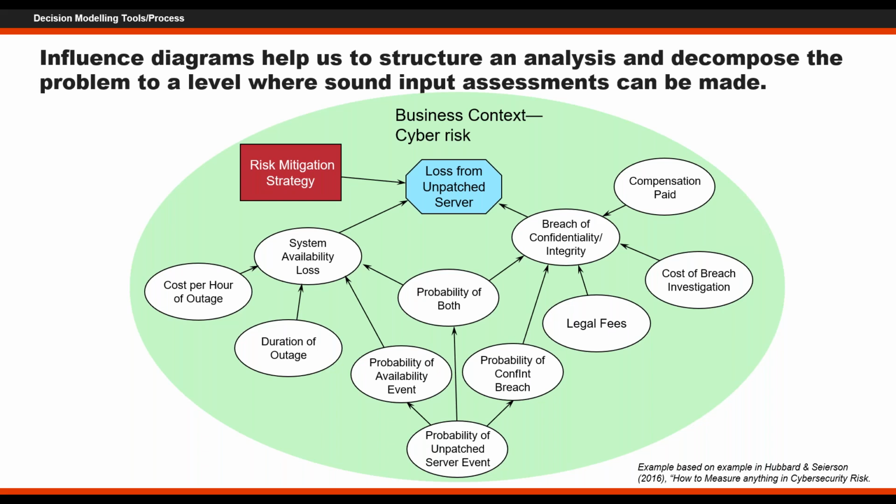But at least it allows us to demonstrate whether the risk owner really understands the risk. Because if they were just doing this on a heat map and they say, oh, the impact is very high, we don't really know what they have factored into their thinking. But if we actually get this sort of a diagram from them, then we can see whether they've factored in the legal fees, and the compensation which may need to be paid to the customers. So I think it gives more confidence on whether the person doing the risk assessment really understands all the aspects of that risk.